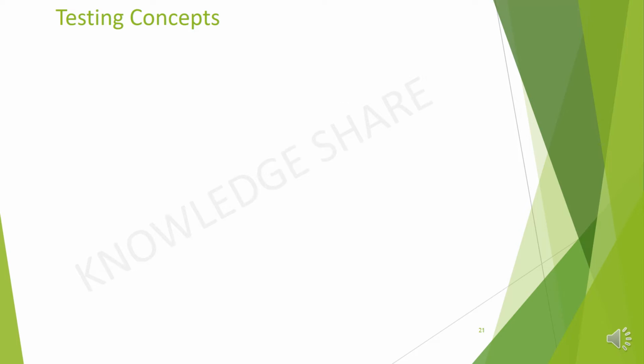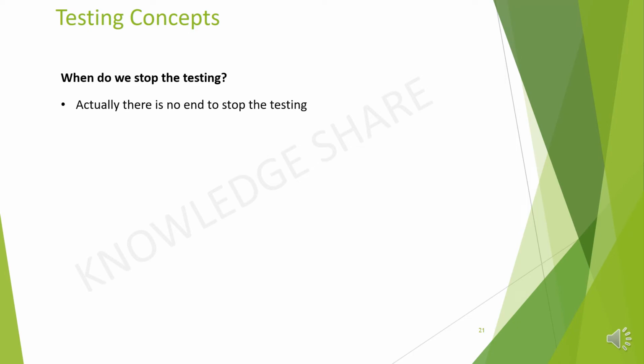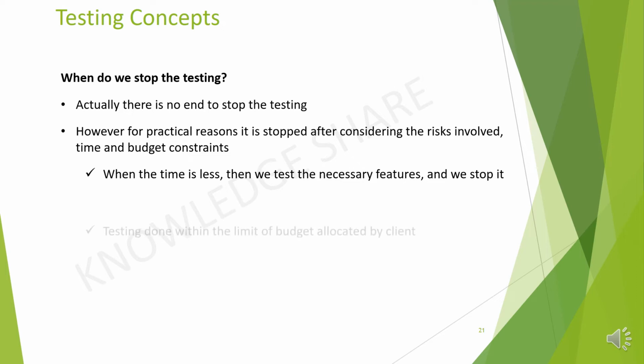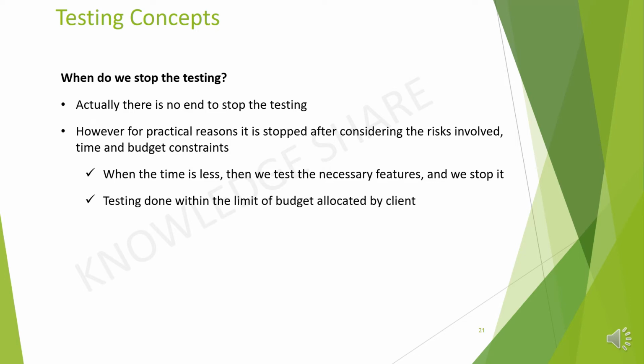Next question, when do we stop the testing? Actually, there is no end to stop the testing. However, for practical reasons, it is stopped after considering the risks involved and time and budget constraint. That is, when the time is less, then we test the necessary features and we stop it. Testing done within the limit of budget allocated by the client.